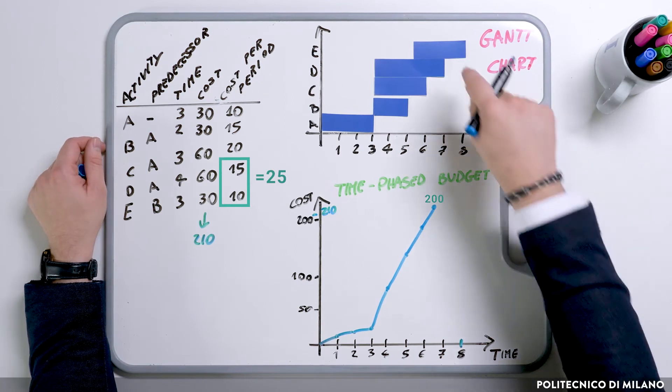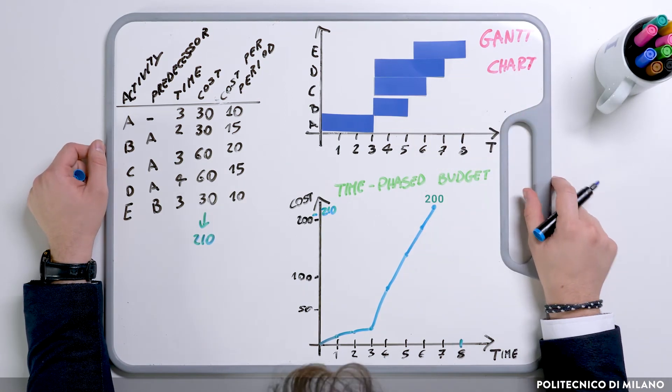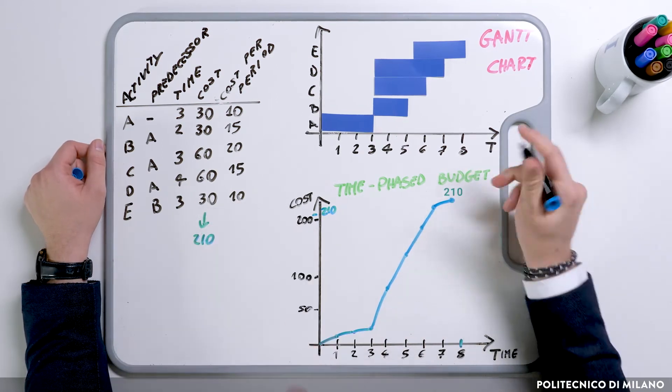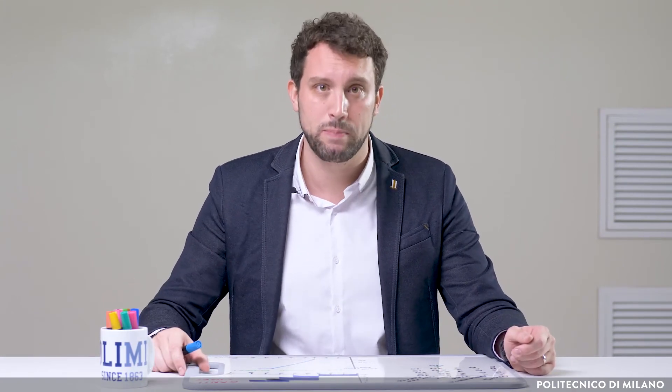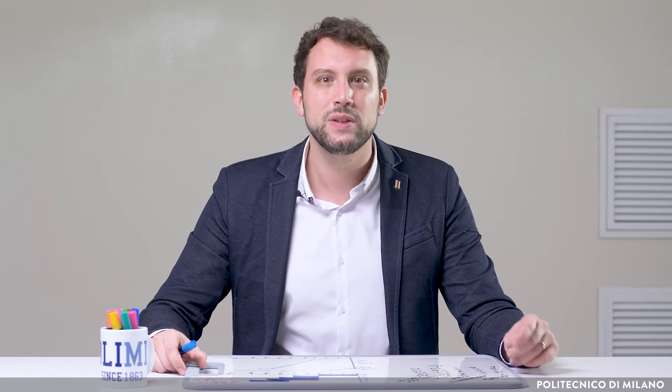Finally, in period 8 we'll have only activity E, moving from 200 to 210. The value of 210 is exactly the planned cost of this example, also known as Budget at Completion, or BAC. This example shows how our project will use the planned resources over time. There are many software tools that, with the right information, would create this for us. I would invite you to use the tool, but to pay particular attention to understanding how it works, to ensure there are no hidden hypotheses or options in the calculation you are unaware of — since you'll be using this tool to make relevant decisions on your project.